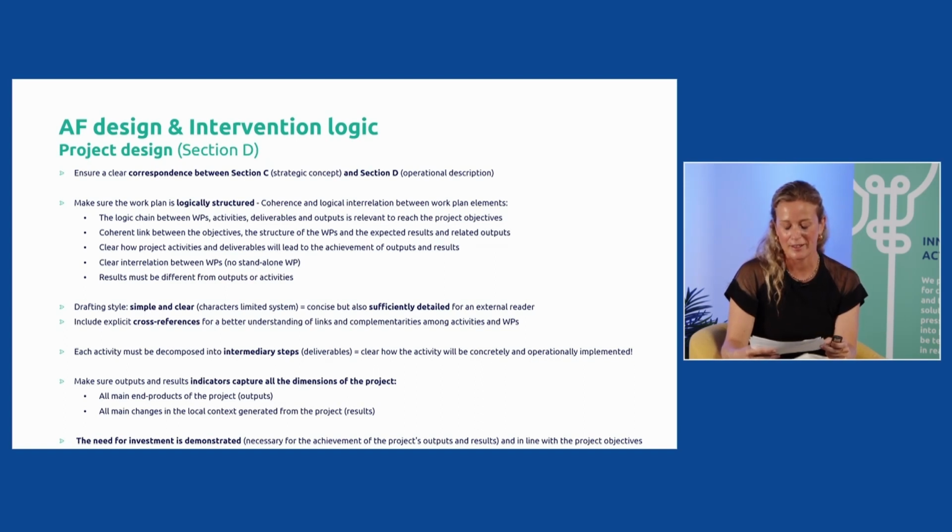Another crucial aspect to think about when designing your work plan is to plan sufficient and relevant deliverables. For us, the deliverables are really the intermediary steps composing an activity. It's only with well-identified deliverables that we can understand the how of your project, how the activity will be concretely and operationally implemented. Without these clear deliverables, even with a good activity description, we remain at the conceptual level and miss the concrete and tangible technical steps according to which you will deliver your activity.